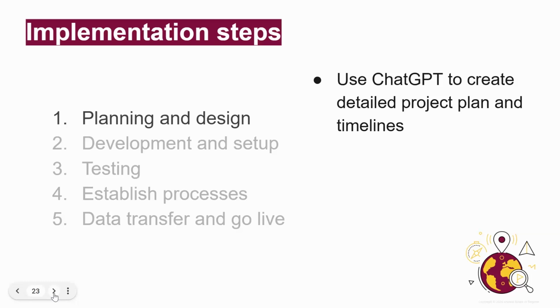And I really went into the nitty gritty. Oh, and I asked it to take on the persona of a project management professional and ask me the questions that a project management professional would ask. And I spent a whole day really collaborating with ChatGPT and putting together this very detailed project plan. I went down to the detail of, I told it the name of the people on our team, how many hours per week they could devote to this project, when they were going to be on vacation. And we ended up with a detailed project plan, a testing plan, and a timeline with milestones for the entire 3 months. It was super useful.